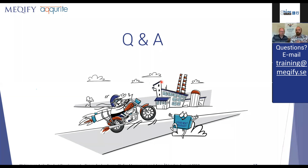When you start doing Scrum in a big company, there are a lot of people interested in what you are doing who come to the sprint reviews. Usually those are not the kind of people you want at the sprint review. So you should ask the team, and a good time to ask is at the focus point meeting: what will you show and what feedback do you want? Okay, we feel quite finished now with the labeling of the product. Can you find and invite a specialist on that? Okay, great.